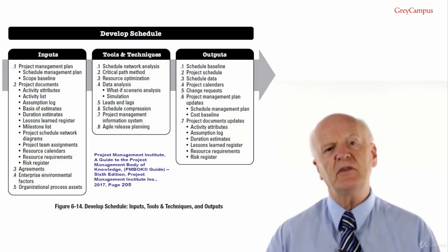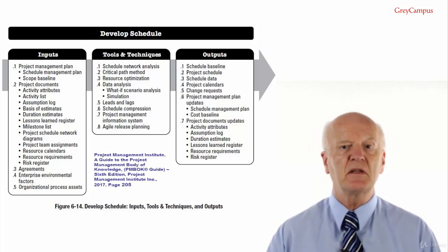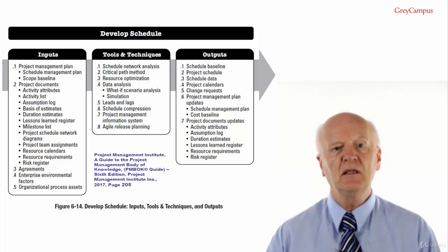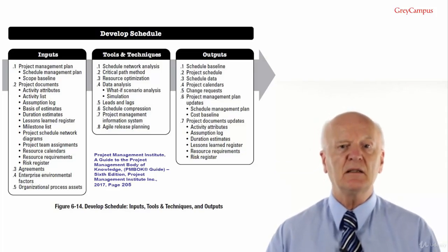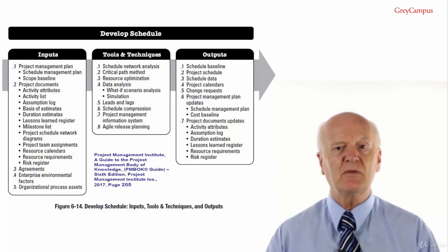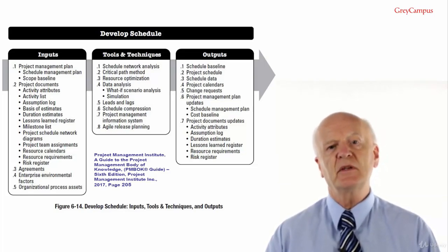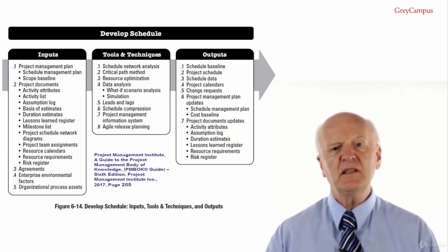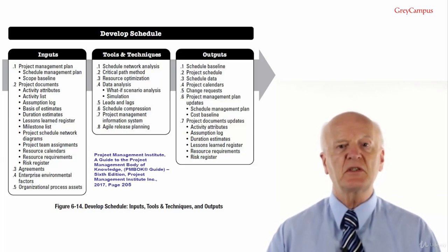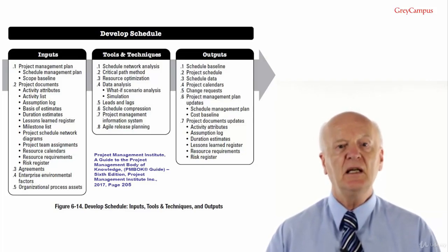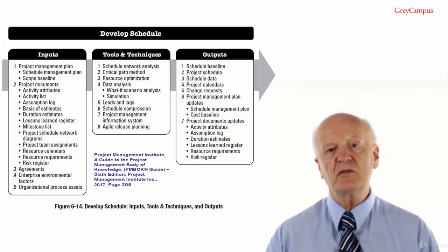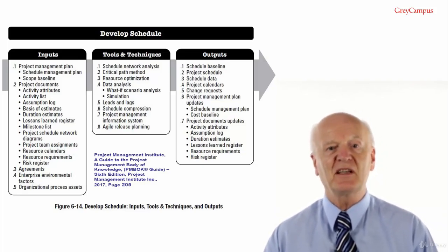Basis of estimates. The amount and type of individual details supporting duration estimates vary by application area. Regardless of the level of detail, the supporting documents should provide a clear and complete understanding of how those duration estimates were derived. Duration estimates. These contain the quantitative assessments of the likely number of work periods that will be required to complete an activity. Lessons learned, as always, can help you develop a schedule model with the benefit of hindsight.